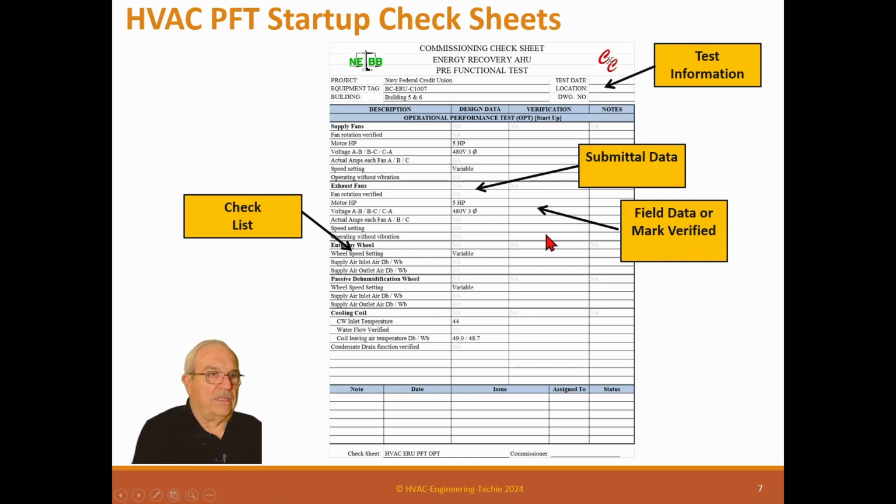That's another thing. We normally ask a contractor to tell us that he checked that and he verified it. There's a lot of things that seem logical that aren't. We ask them not to use check marks. We ask them not to say okay, because I don't know what that means. The check mark may mean I've tested it, may mean I'm going to test it. It may mean it failed. It could mean all kinds of things. I want words that have meaning.